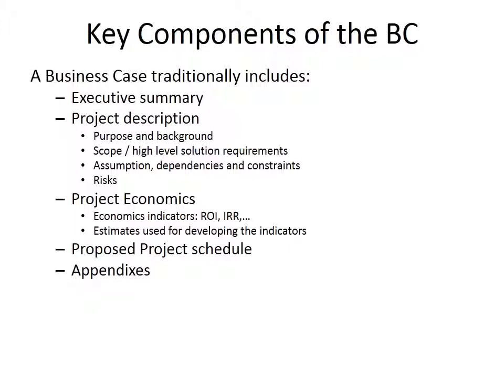Again, we'll start with the executive summary, but there will be three major sections in a business case. The first one is the project description, presenting why we came up with this idea, this initiative, this future project. So we'll have the purpose, the objective, the background. Hopefully we'll start having an idea of the scope or high-level solution requirements, and we'll include all the elements, as we are at a very early stage, in terms of the assumptions, dependencies, constraints, and risks associated with this